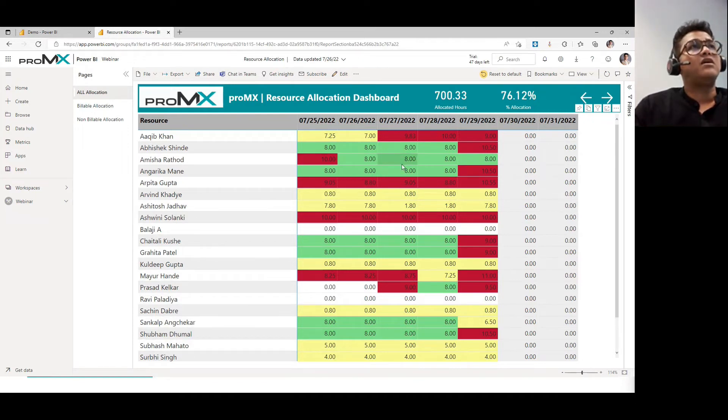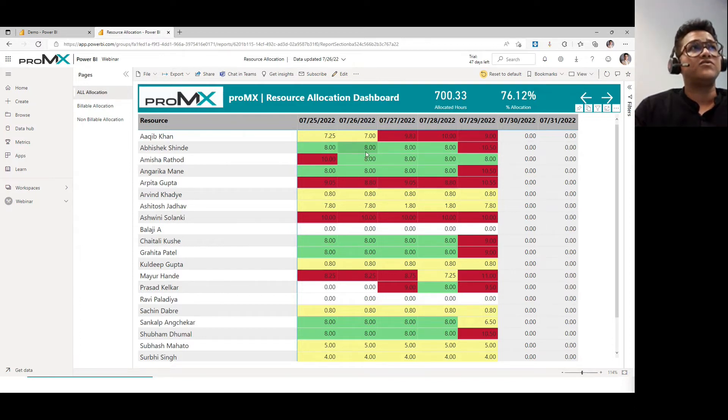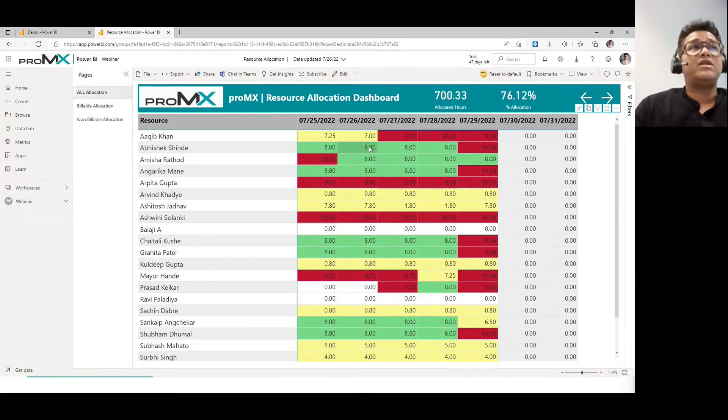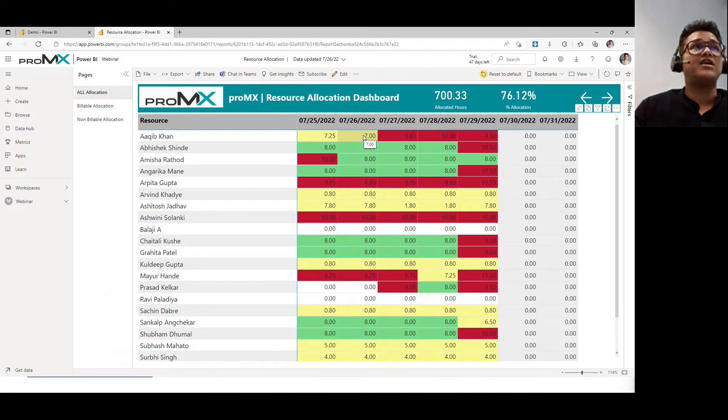This is the current week allocation and you can see some colors. So colors flying around is like eight hours, a person works for eight hours a day. And so if they are completely allocated, they will be green in color. If they are less than eight hours allocated, they will be yellow in color.